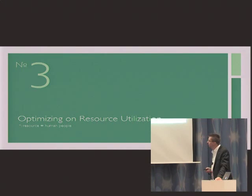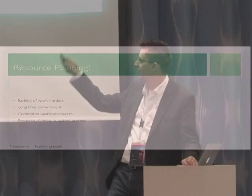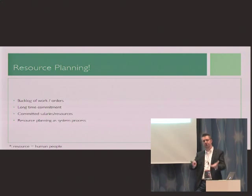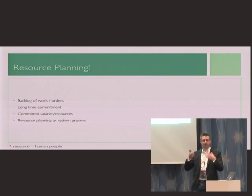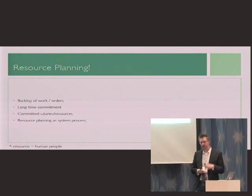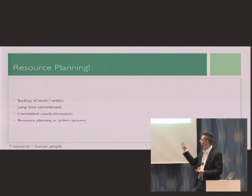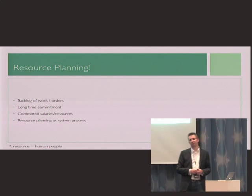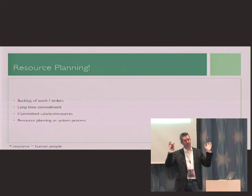We're optimizing on resource utilization. Resource means human at this point. We think we need to do some resource planning. So what we do, we take our backlog of orders, and we want a long-time commitment. You have the agency with 20 people, and you say, I want to know, will there be enough work in May, June, September? Let's have a large backlog of orders from potential clients, and we start somewhere in three or four months because you have committed salaries.